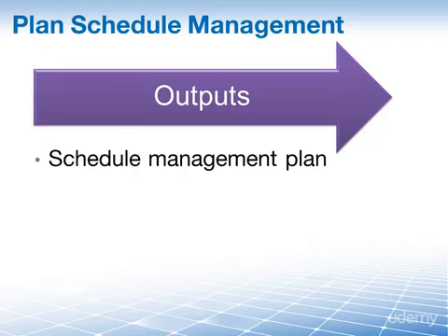So let's think back to the very beginning. We talked about the 7 processes here in project time management. Well, in this plan, we are going to talk about how we are going to define the activities on our project. What type of methodology are we going to use for our sequencing? Who is going to estimate the activity resources? What type of approach are we going to use to estimate activity durations? What software are we using to develop our schedule? And are there any specific rules that we follow in regards to controlling our schedule? All of this will be documented in the schedule management plan.